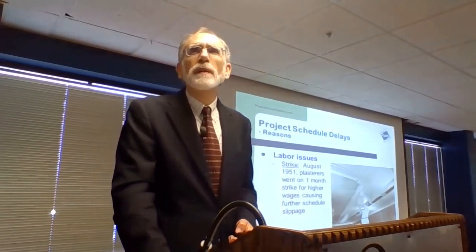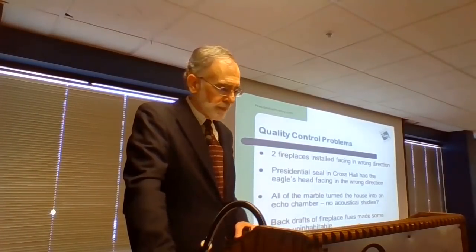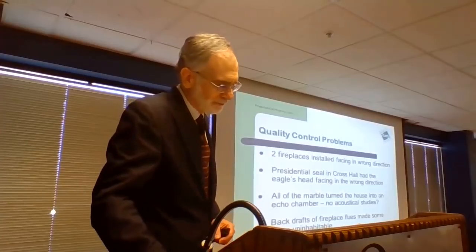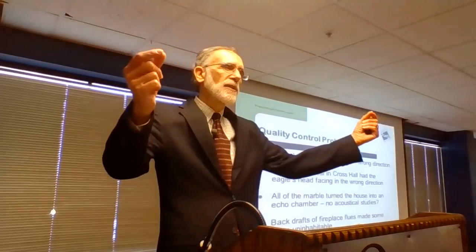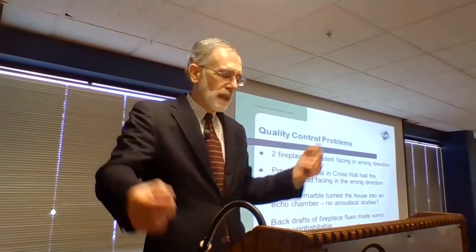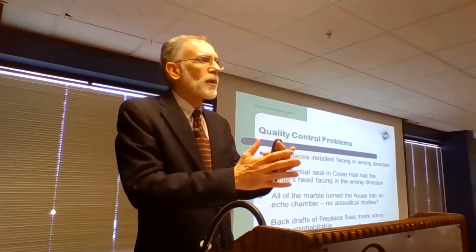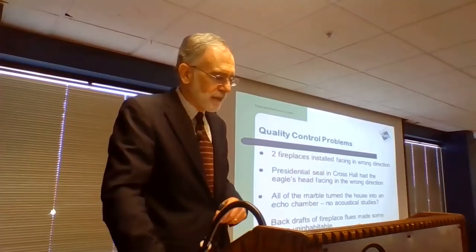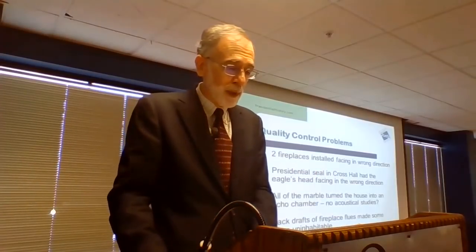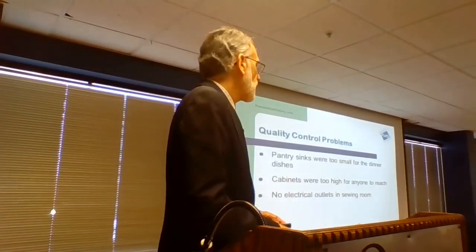This is a project that was moving very, very fast, and so there were also quality problems that came up. There were 2 fireplaces that were installed in the wrong direction. The presidential seal in Cross Hall, that hallway that connects the East Room with the state dining room, had the eagle's head facing in the wrong direction. There's all this marble being installed, so it turned the White House into kind of an echo chamber. There were backdrafts of fireplace flues that made some of the rooms uninhabitable. Pantry sinks were too small for some of the dinner dishes. The cabinets were too high for anybody to reach, and there was no electricity in the sewing room.